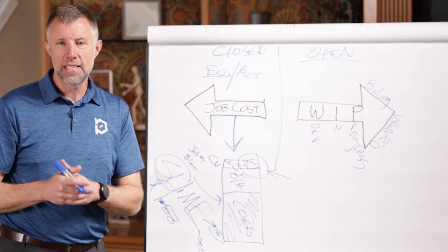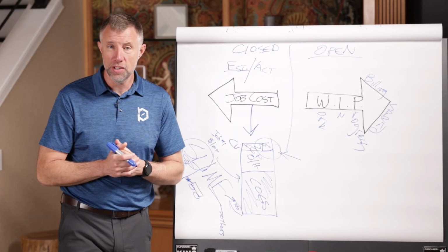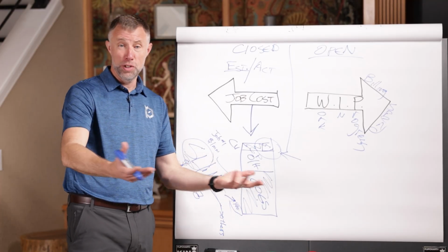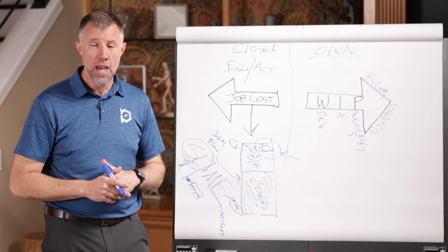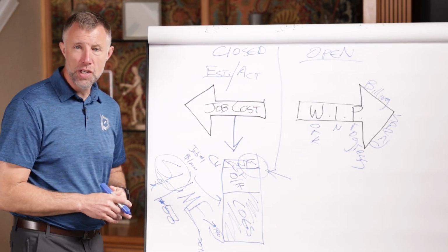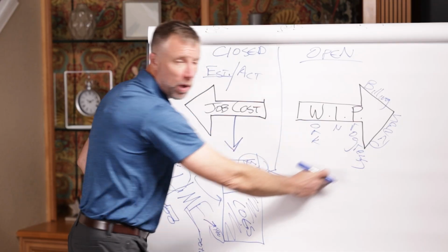We're doing a project at this little agricultural building that we have right now. We're having a guy build a little room in it. And so I showed up the other day, and guess what's on my driveway? A package of 2x4s and 2x6s and all the material he's going to use. Well, guess what? He hadn't gotten payment from me yet. And so WIP billing is essentially looking at him as a contractor. What has he billed versus what has he already spent?